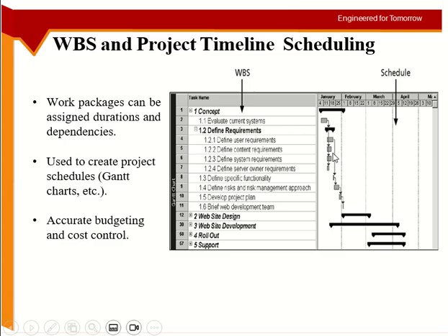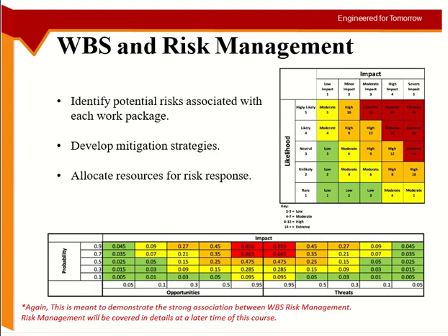The rest are finishing in 1 week or less. So the total time of this phase is 2 weeks, which is the duration of the longest. So we didn't do this plus this plus this plus this. There is no addition here. So in the timeline, this is a more accurate representation because it can cater for the overlapping between different activities. For the cost it doesn't matter, because it is a simple summation in the end.